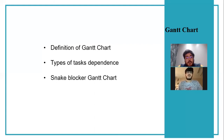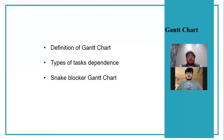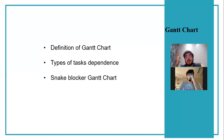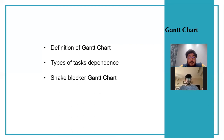Now let's move to the types of task relationships in a Gantt chart. There are only four types. The first is Finish-to-Start (FS). The second is Start-to-Start (SS). The third is Finish-to-Finish (FF). The fourth is Start-to-Finish (SF), which means task two must start before task one can finish. For example, for Finish-to-Start: if you are going to wash your car, you must finish washing it before you can dry it. You cannot drive the car without finishing the washing.